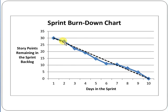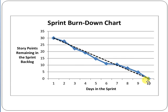The light blue line shows how you are actually progressing. For example, on day 2 you were ahead of time, on days 3 through 6 you were lacking and below the required speed. Then on days 7, 8, and 9, you expedited the work, and by day 10 you reached the required story points. This comparison of planned versus actual progress is the core of the sprint burn down chart.